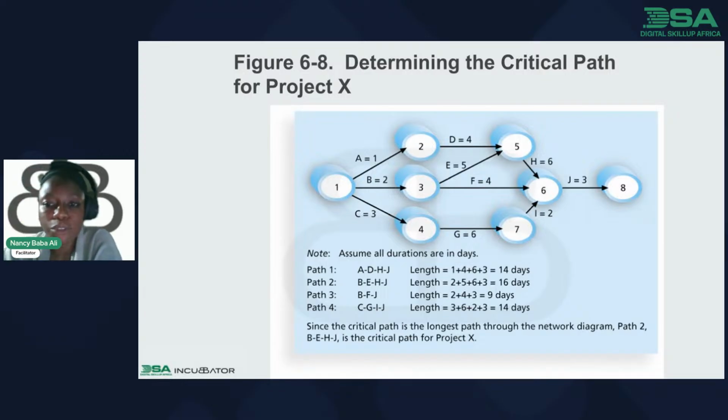under three, you have to make sure that you accomplish some level of the task in order to do five and in order to do six, meaning that three is a very important task that you have to do. If you do not do three, that means task five and task six are in chaos. You cannot do anything. You understand? It means that you cannot proceed. So number three is very important for you to be able to achieve number five and number six. That is just what it means. I hope you understand that.